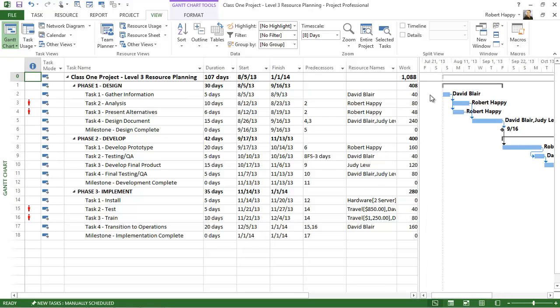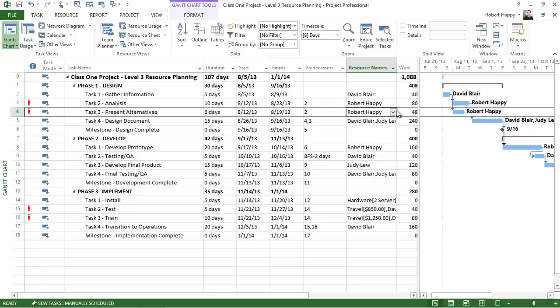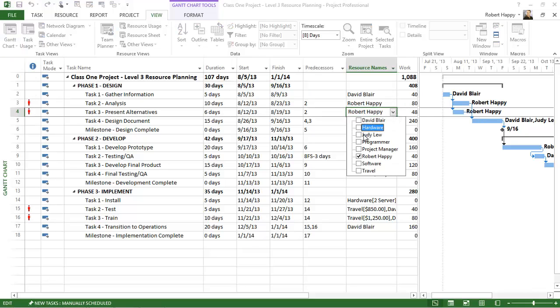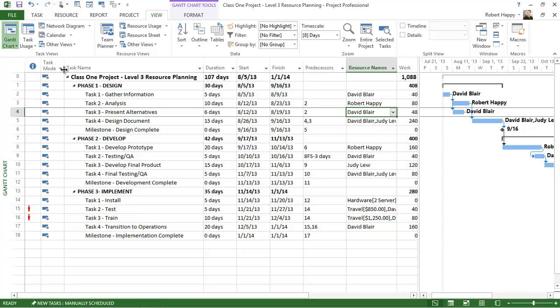Here you can see that Robert's assigned to these two tasks and you've got a project scheduling conflict. I can simply assign another resource, take Robert off and assign David to that task, and that indication goes away and that resource overallocation has been resolved.